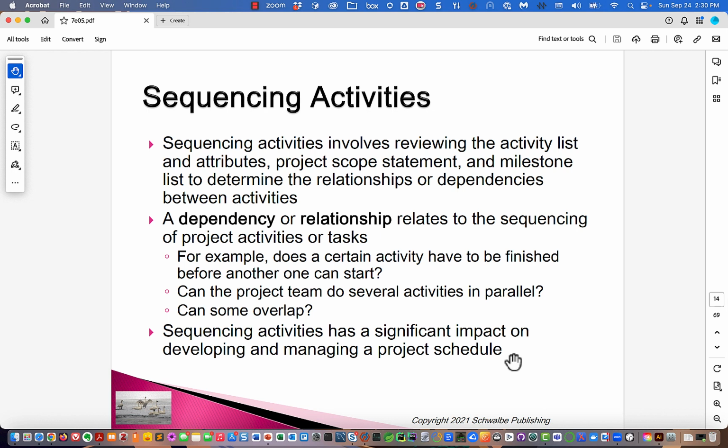Wave one, you don't take resource constraints into account and you come up with some kind of idealized schedule that says, if I had all the workers in the world and all the machines and all of the tools in the world, then how long would it take to do the project? That'll give you a date. It's not realistic, but it's never going to be faster than that.